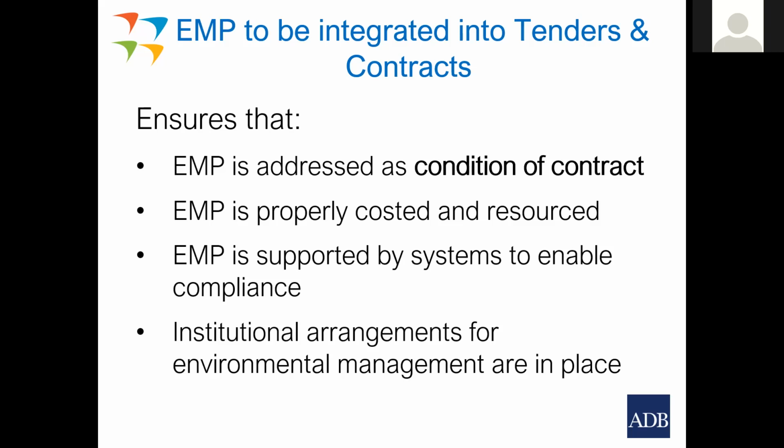It needs to be supported, the EMP in the contract needs to be supported by systems to enable its compliance. And it ensures that institutional arrangements for the environmental management are in place. So integrating the EMP with the tender documents is absolutely essential. I can't stress that enough. We can't miss this step, because after the contract has been awarded and signed, it's too late to try and enforce the EMP's provisions. You just can't.